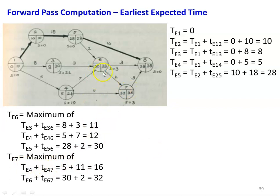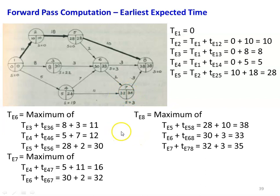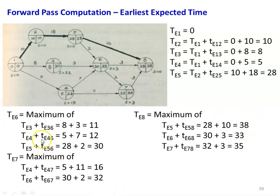TE7: two incoming arrows — maximum of (TE4 plus t(4,7) equals 5 plus 11 equals 16) and (TE6 plus t(6,7) equals 30 plus 2 equals 32). The maximum time is 32, so TE7 equals 32. TE8: three incoming arrows — maximum of (TE5 plus t(5,8) equals 28 plus 10 equals 38), (TE6 plus t(6,8) equals 30 plus 3 equals 33), and (TE7 plus t(7,8) equals 32 plus 3 equals 35). The maximum value is 38, so TE8 equals 38. In the forward pass computation, we have calculated the earliest expected time of all events.